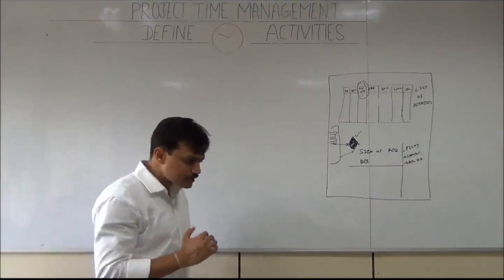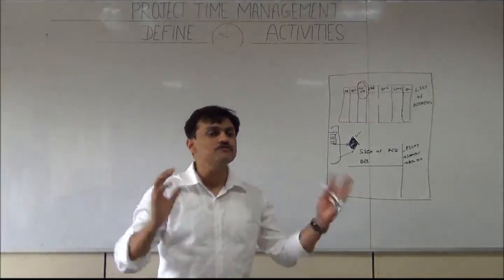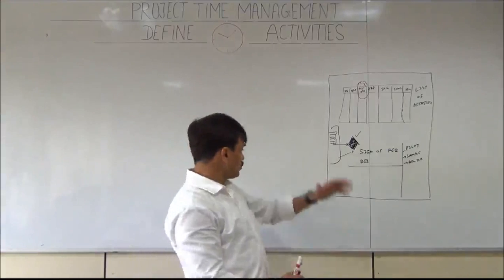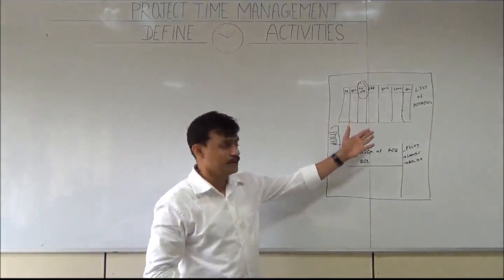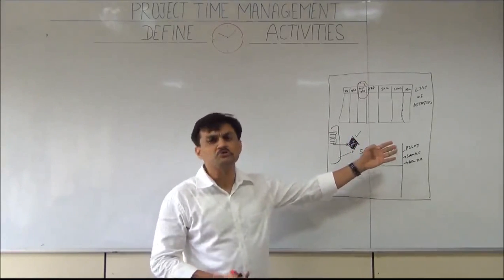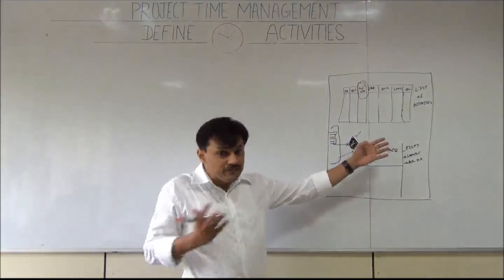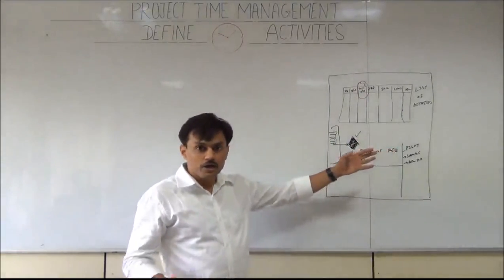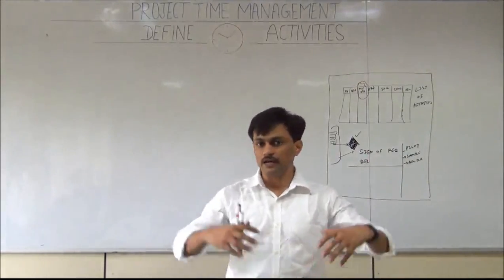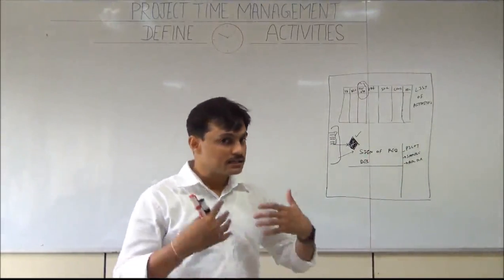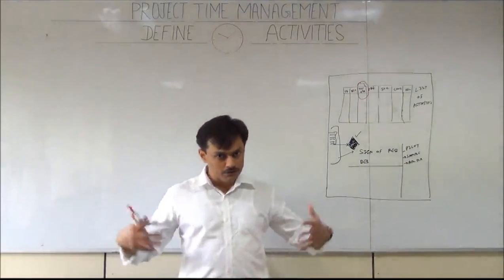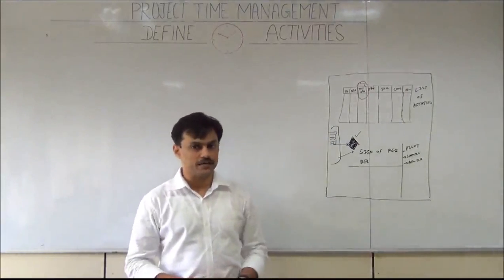Now, level of effort activities give a framework to a project. For example, if you are doing a project monitoring meeting, you need to identify that in the activity list, that we will conduct a project status review every Saturday. This status review does not produce anything and does not verify anything, but it is required to give an environment and framework where discrete effort and apportioned effort can work. So level of effort activities are in general a kind of support which gives a framework under which discrete and apportioned effort activities can be done.